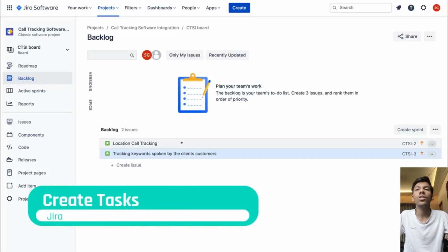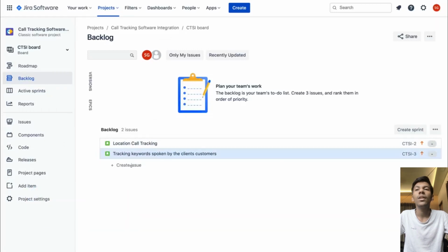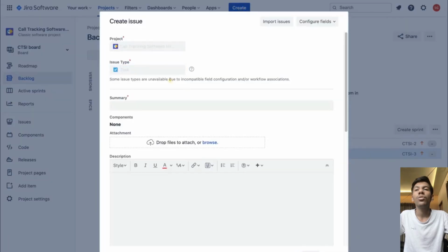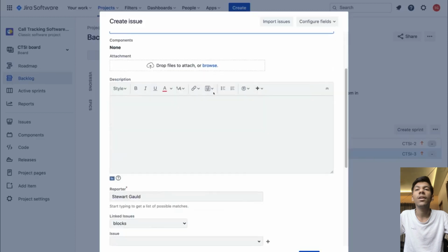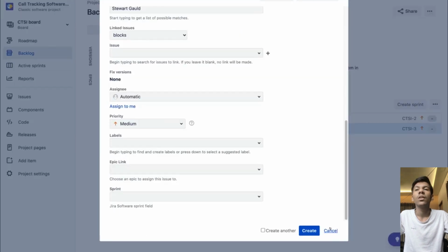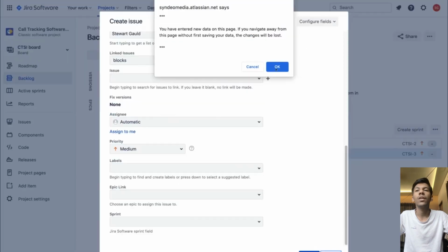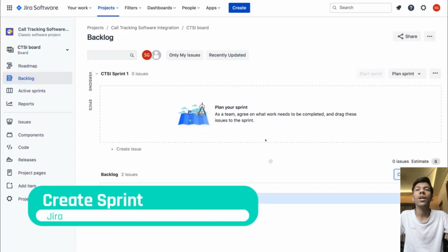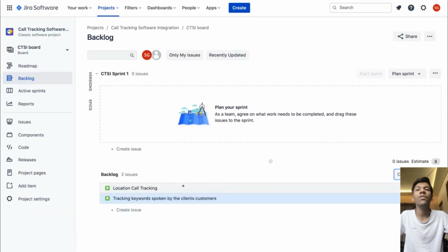I can also change the duration of the sprint. So I am going to go for 4 weeks. Everything within the project workflow must be completed within 4 weeks, and then I can add other information down here if I like. But I am going to go ahead and click start, and here you can see the project sprint. You can see we have to do, in progress and done sections. We can also navigate up to complete sprint once all the tasks and stories have been completed.